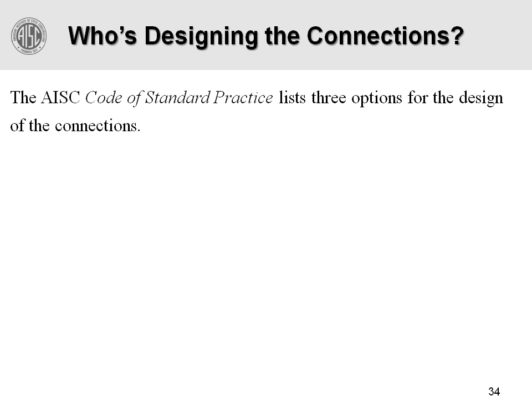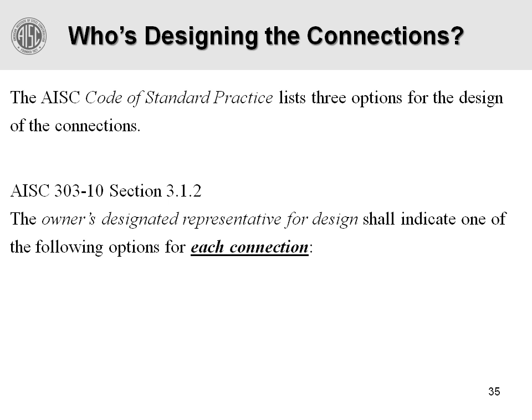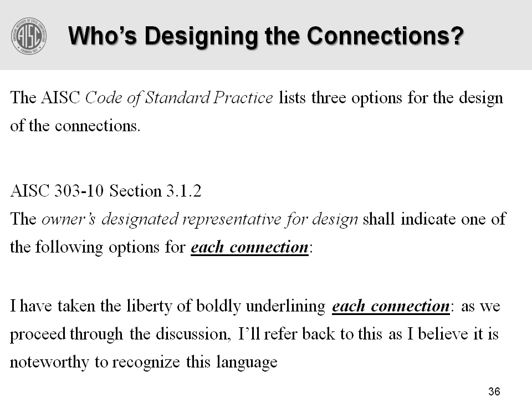So who's designing the connections? We'll talk about the 2010 version of the Code of Standard Practice and the options that the structural engineer has. The AISC Code of Standard Practice now gives three options for designating connection design, given in Section 3.1. It starts out by saying that the owner's designated representative for design — that is the structural engineer of record — shall indicate one of the following options for each connection. I have taken the liberty of bolding and underlining those two final words, 'each connection,' as I believe that is important language.